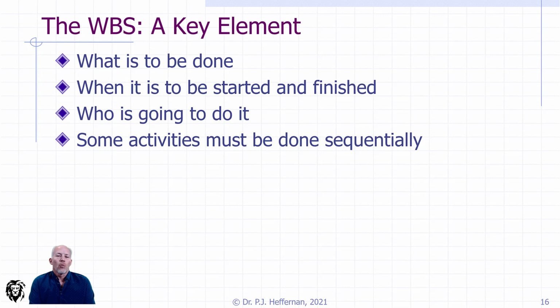And what needs to be done? What is the context around my work package? What needs to be done before I get here? What needs to follow shortly after or immediately after this work package is finished? So some sequential perspective as to where it fits into the other tasks within the work breakdown structure.